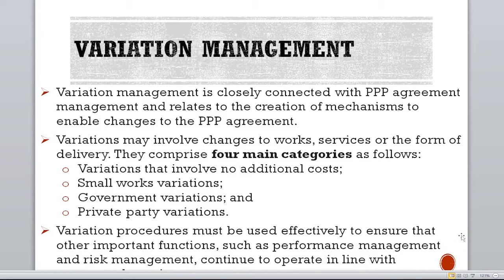Variation can even come from the government side; the government might change policies that might affect the project. Like all of a sudden, the Nigerian government barred borders for over a year because they felt there was smuggling and a lot of abusive trade practices with our borders. The borders were porous. The government wasn't taking PPPs into consideration when it made that decision. It just made that unilateral decision. And who knows, there might be some consignments on the way across borders that might have affected those who have entered some PPP with the government.